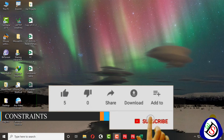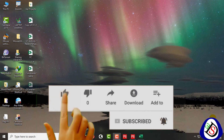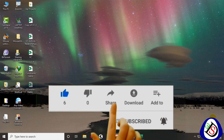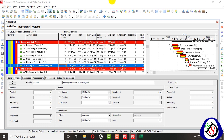Welcome to Softy Dummy. Today our course is on constraints — how to assign constraints to activities, what are constraints, and why we assign constraints to activities in Primavera P6. A constraint is an externally imposed factor affecting when an activity can start or finish. In Primavera P6, each activity can have up to two constraints applied to it when a project is scheduled.